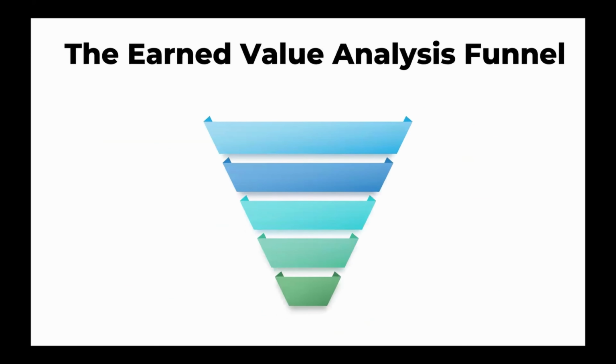In monitoring and controlling, earned value analysis reports are used to guide decisions and maintain control over your project performance. If you're able to track EVA, you're able to quantify the project health, numbers-wise, without prejudice. If you're able to quantify project health through numbers, then you can communicate variances early when those numbers are off.